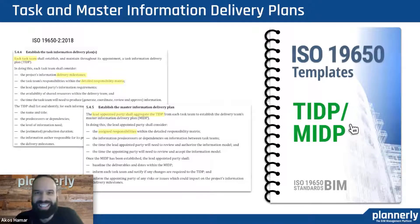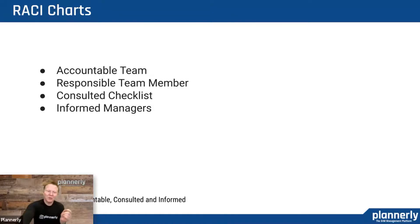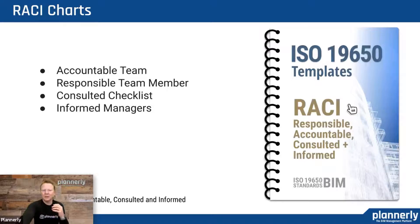We happen to have a template for that. And then RACI charts — lots of people pronounce these differently. How do you assign accountability to a team, responsibility to a team member, and have consulted people at the right times and people that are informed about the results? It's responsible, accountable, consulted, informed. Being able to assign somebody specifically as a responsible person is really, really powerful — not just having a list of tasks, but making sure they are assigned to the right teams. Inside the RACI charts, you see all those ISO 19650 clauses and a grid to assign who is responsible, who is accountable, who needs to be consulted, and who needs to be informed.